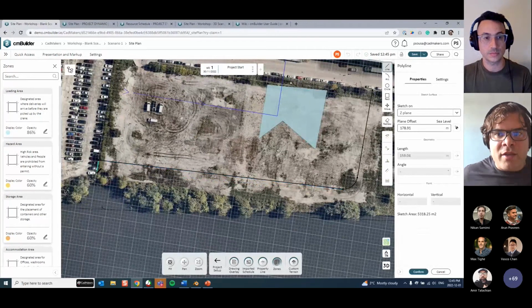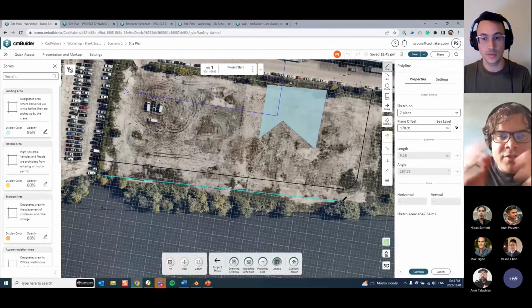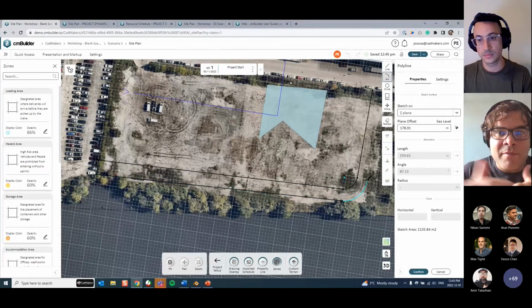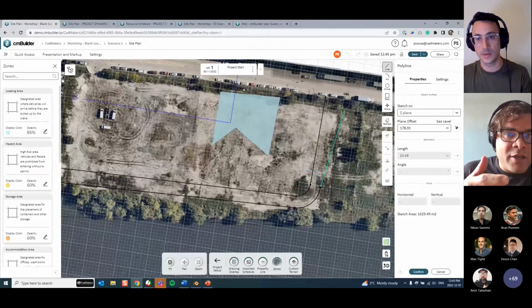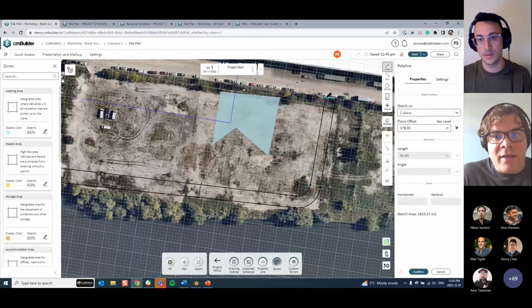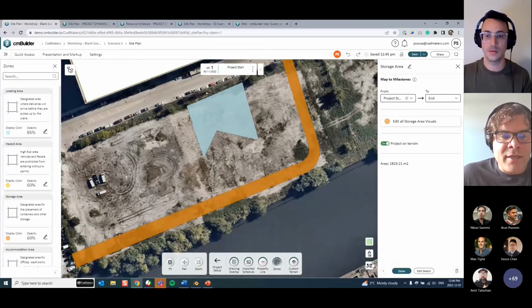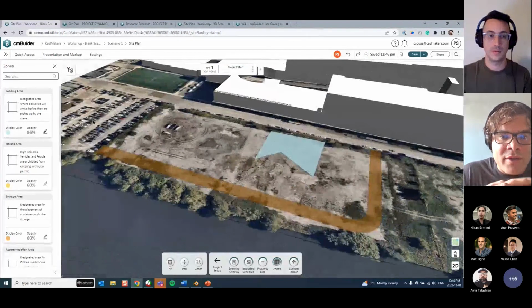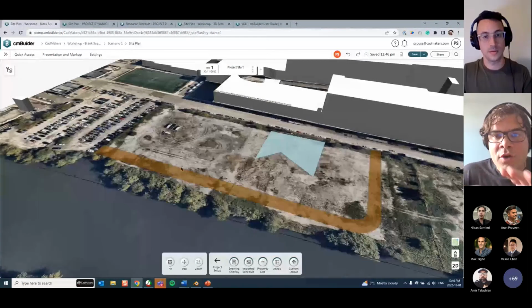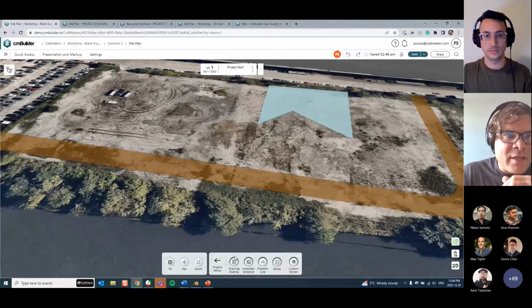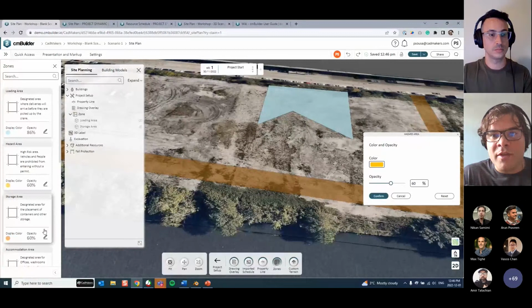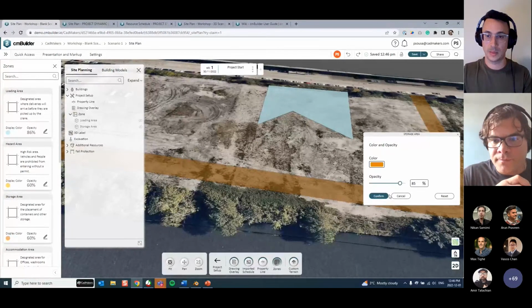We get asked a lot about making roads, because there are often temporary roads during the construction process that may not be covered in the design documentation, since you have a final as-built design. We have some roads in the catalog, but they weren't really working on the grid. So this is a good workaround: use the zones as roads, as Pedro will show, to show temporary things that are coming and going throughout the job that may not be in the drawings or in the model when you import it.